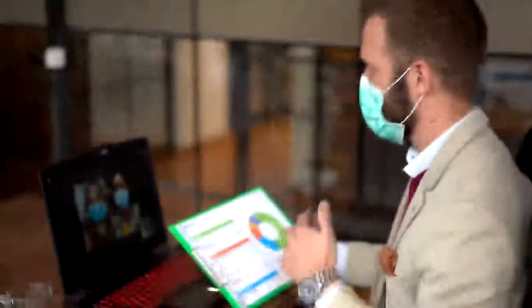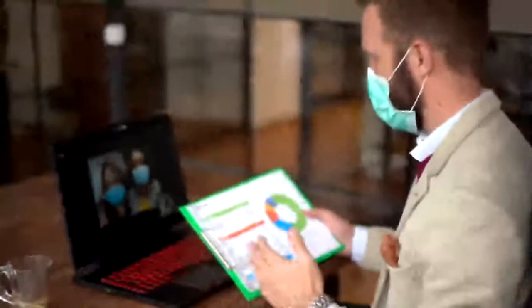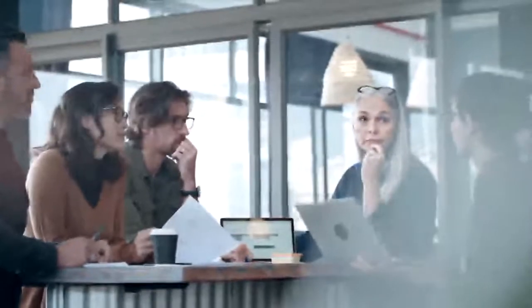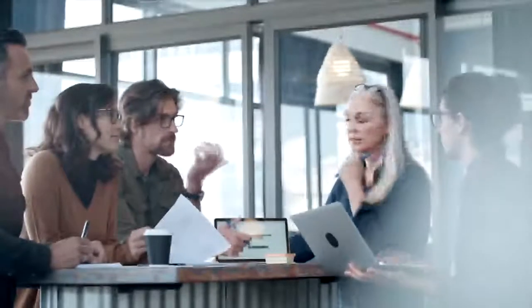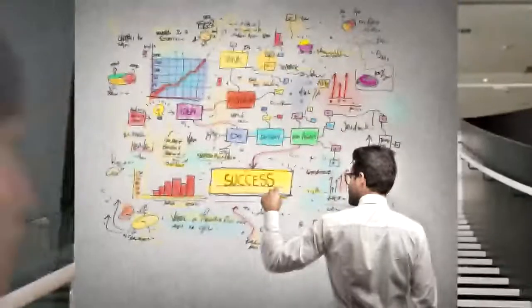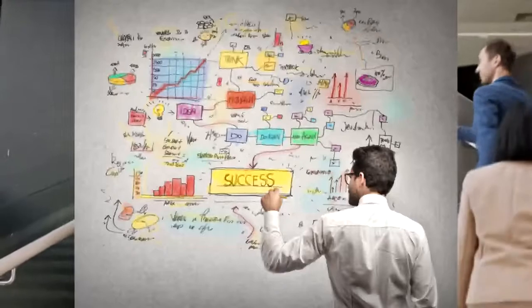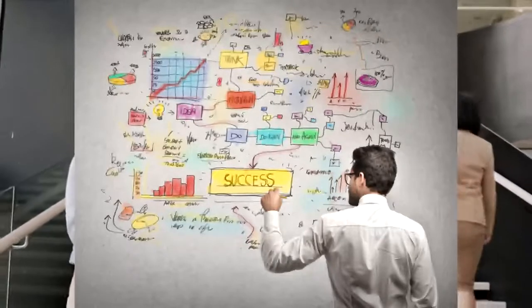We should have flexible contract arrangements to enable us to respond to what the customer really wants. Because if money is the question, then we are in the wrong place. We are not in an agile mindset. We are in a competitive mindset, which is not one of collaboration. But if we're in the right mindset, we would have a contract, an MSA, with tinier little flexible arrangements in place, and we would base our delivery on something more overarching. Take a look at page 77 in the Agile Practice Guide. Agile processes harness change. Agile contracts should harness change.